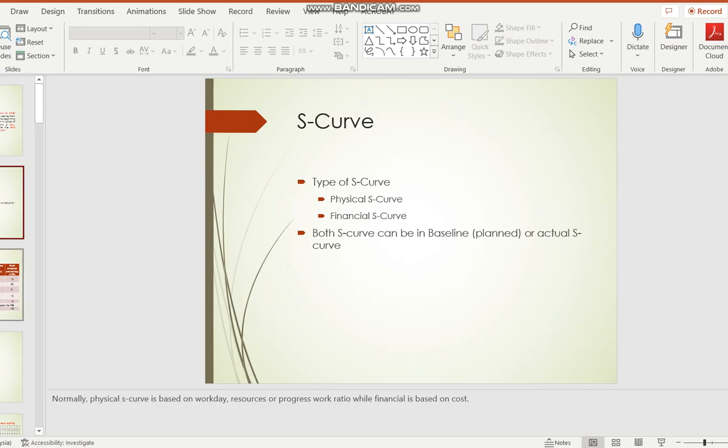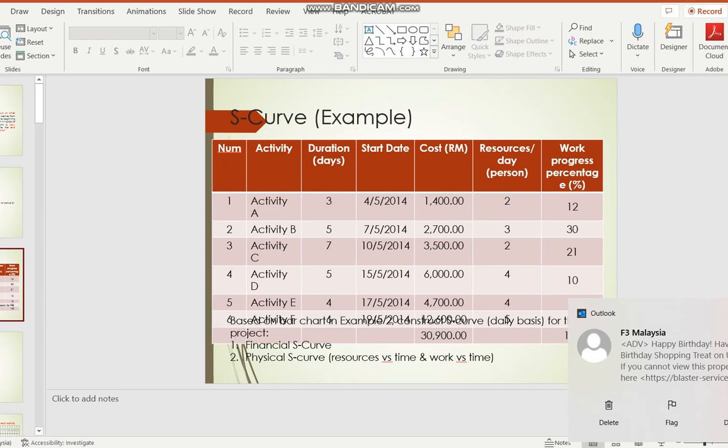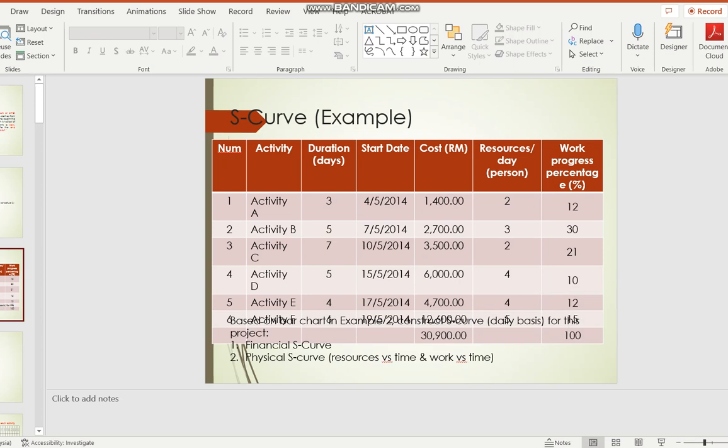Okay. So how do we produce that curve? That's the first thing. Whenever you have the work breakdown, after you've done your work breakdown, and you've got your duration as well, you've got the schedule basically, and then for every activity, after you've done your costing estimates, once a budget is approved in your BQ, essentially there is this major activity with the cost or the budget for that particular work. So let's say this is the final budget. For activities like, for example, general preliminaries, you will have like 200,000.